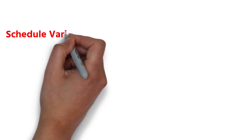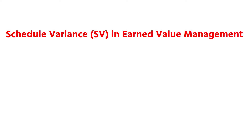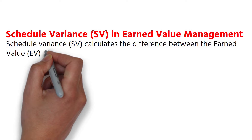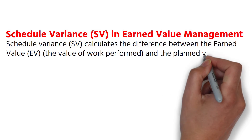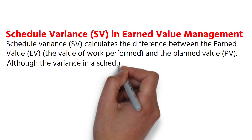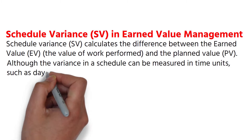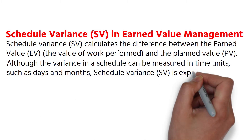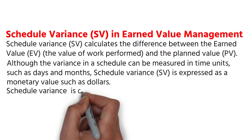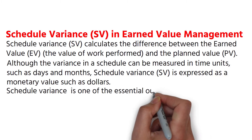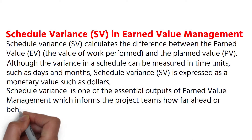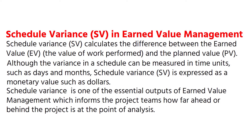Schedule Variance in Earned Value Management. Schedule Variance calculates the difference between the earned value — the value of work performed — and the planned value. Although the variance in a schedule can be measured in time units such as days and months, Schedule Variance is expressed as a monetary value such as dollars. Schedule Variance is one of the essential outputs of Earned Value Management, which informs the project teams how far ahead or behind the project is at the point of analysis.